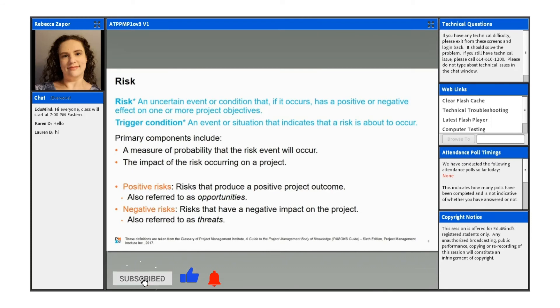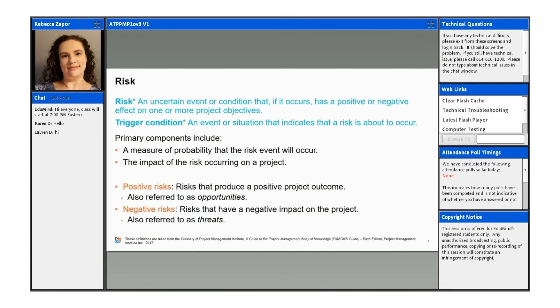So a trigger condition, we talked about that trigger condition, triggers can come from external factors that are going to influence your project. It could be like a proposed change in maybe legislation or some type of guidelines, especially in specific industries like technology or even in the medical field like the HIPAA and everything, like different privacy guidelines and things, those can change. That can cause a risk to your project.